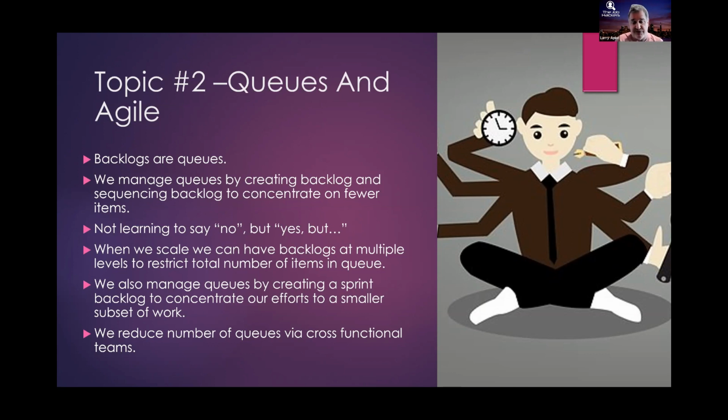Above stories, we sometimes have another level, epics or features or whatever you want to call it. I don't care what you call it, but that should be in a backlog and it should be managed by someone with value, effort, and sequence so that the teams understand the sequence of the backlog that is above them so they know what work to do. Right? That's how we scale. Anyway, I'll go into more detail later. I'm getting to your question in a second.